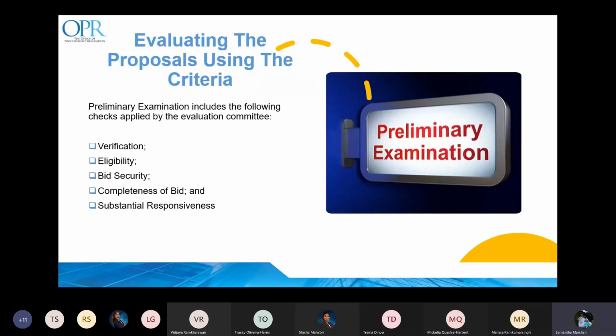Eligibility. If pre-qualification or pre-selection has taken place, bids should be from pre-qualified bidders. The bidding documents may require the submission of a bid security or a bid securing declaration. If required, these should conform to the requirements stated in the bidding documents and must accompany the bid.